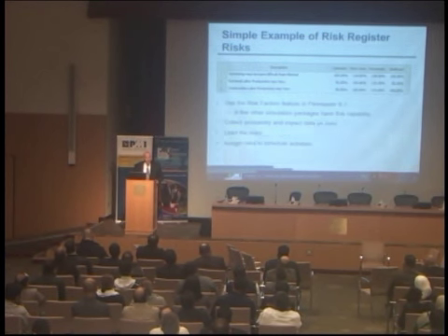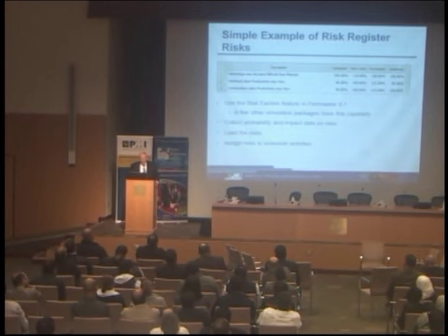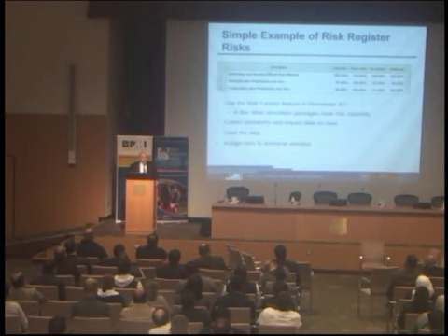And the best place to include it is in the risk analysis because there's no definitive way to include it in the raw schedule itself. Technical labor productivity may vary. In fact, it could be higher, and therefore the durations could be 10% lower. But it's not always higher. Productivity could be lower, so it's 15%. That risk is only 50% likely to happen. So what happens? 50% of the time, it doesn't happen at all, and the durations of the activities are okay, at least from that risk alone.